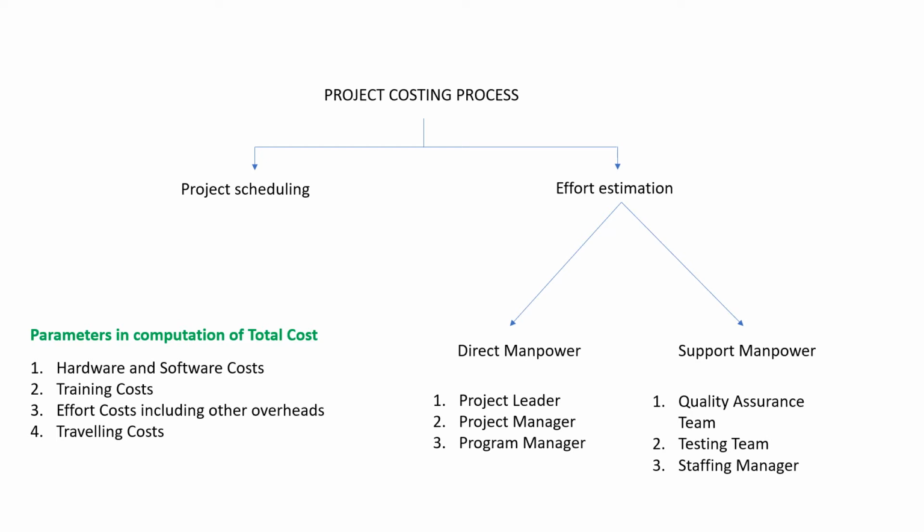All that is to be considered as direct cost. It should not be taken as overheads wherever it is clearly identifiable. And even traveling cost, if it is specific to the project, can be allocated directly to the project. If not, it will be taken to overheads.